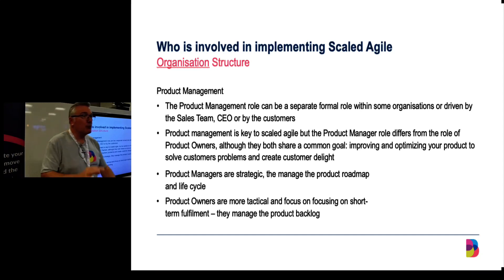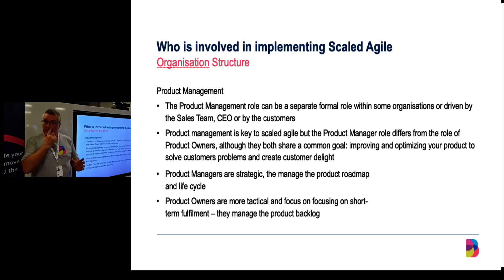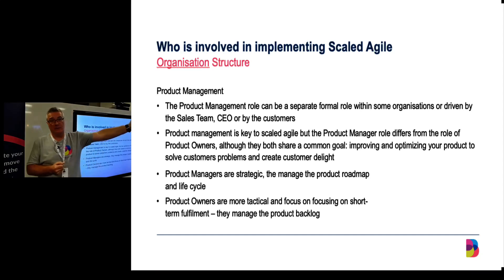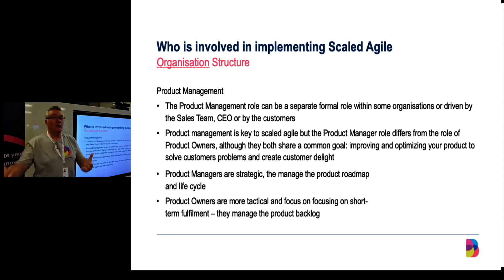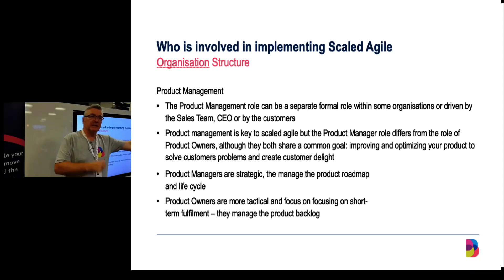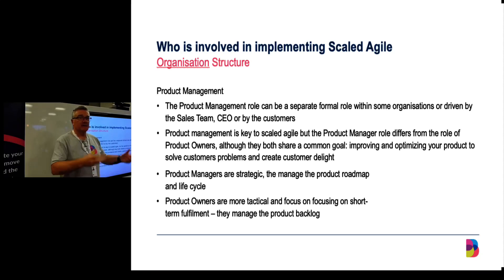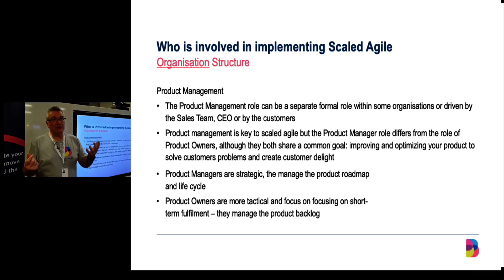Product management versus product owners — these are not the same. A product manager looks at the distance: where do we want to go, what are the opportunities, talking with customers not about their problem today but what their problem is going to be next year and the year after. That is a key role. Product owners know the detail and the now. A lot of scaled agile frameworks do have both: product management to allow the product owners to do their job.